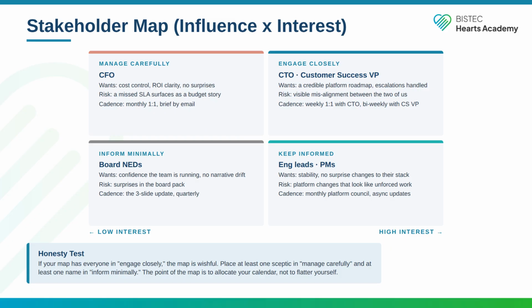Eng leads and PMs live here. They want stability and no surprise changes to their stack. The risk is platform changes that look like unforced work. Cadence: monthly platform council, async updates. Inform minimally, bottom left. Low influence, low interest.